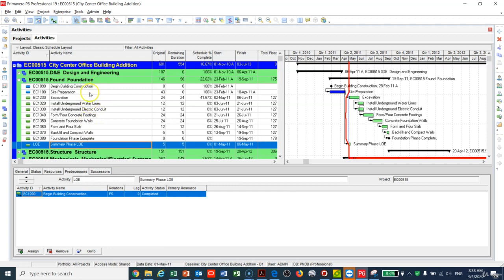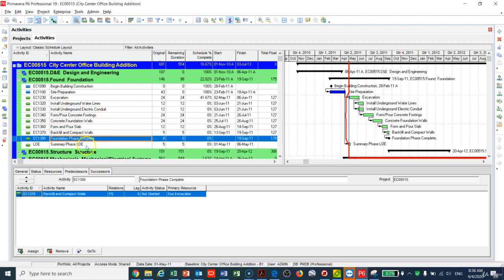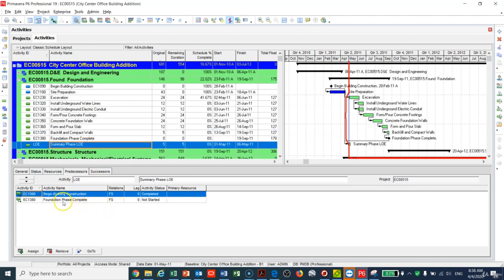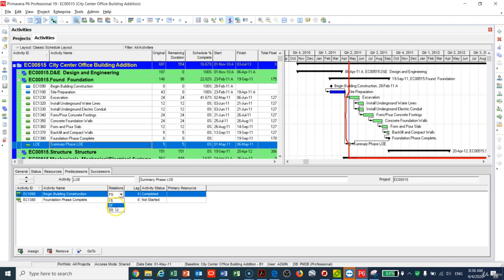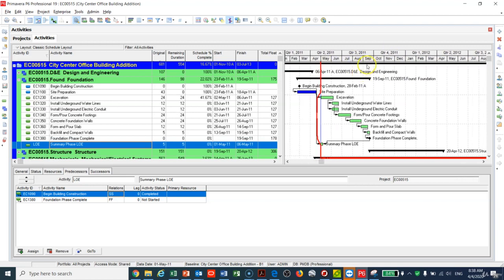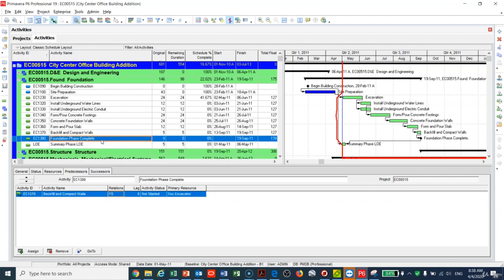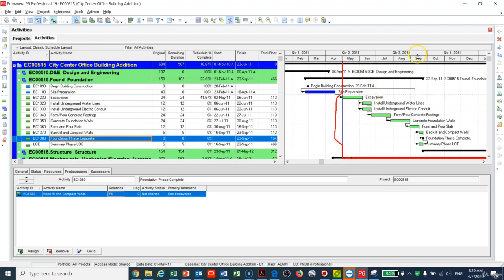I also need to tie this activity to the end of the phase. I'll highlight both activities, right-click, and link them. Then I'll verify I have Foundation Phase Complete linked and change the relationship so it is finish-to-finish with the end of the phase and start-to-start with the start of the phase. After making any changes in P6, you must press F9 to let the program recalculate.